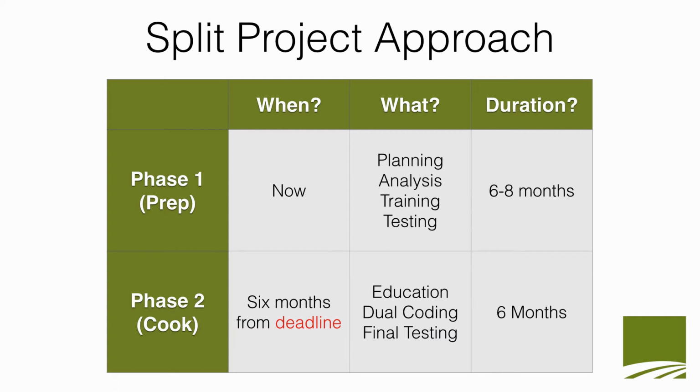So for instance, for physician education, you need to have completed a baseline documentation analysis, you need to have completed an education plan, and you need to have all of your ICD-10 educational resources lined up and ready. We're not going to begin physician education until we are absolutely sure that the deadline is not going to change.